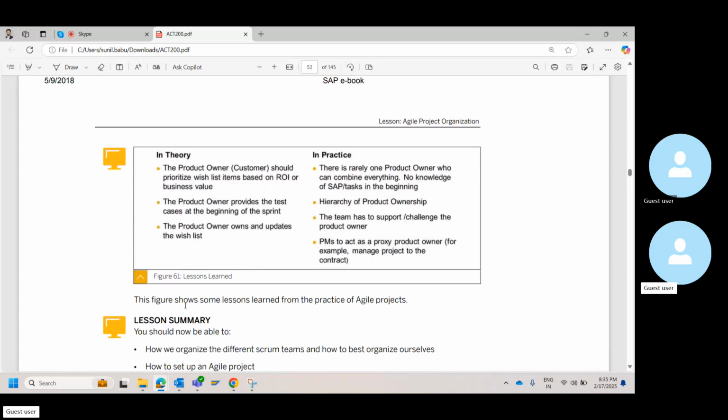Similarly, after each phase, you set up a workshop and discuss and draft the lessons learned from all the modules and all the consultants from your team. They'll give you the list, and whatever the learnings of the first phase are, you'll incorporate that in the second phase. By the end of the project, you submit the learnings to the PMO, and the PMO will have a central repository for a specific project.